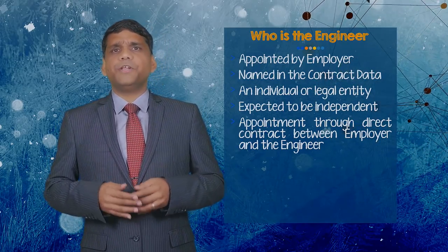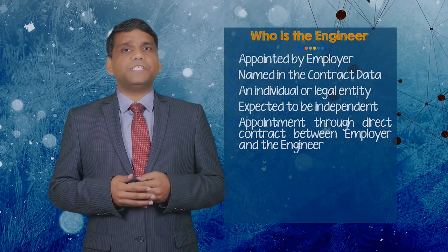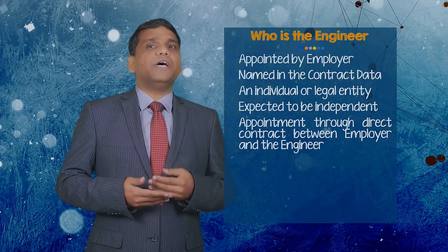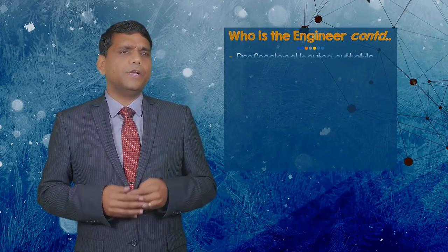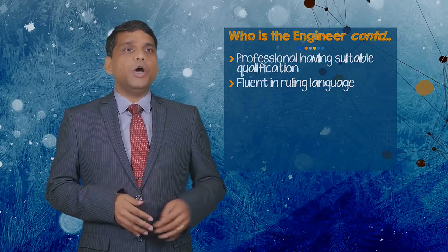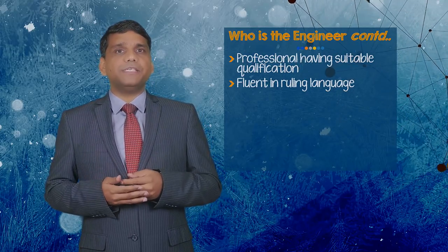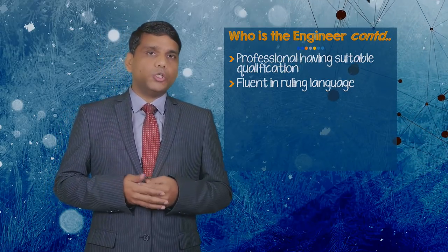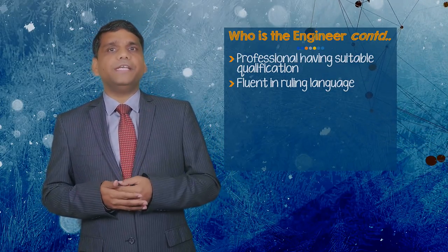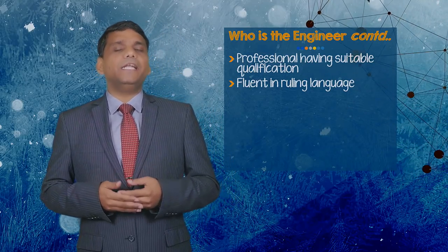The contractor will frequently accuse that the engineer is influenced by the employer's wishes and is unable to act neutrally if he is an employee of the employer. Further, sub-clause 3.1 requires that the engineer should be a professional engineer having suitable qualification, experience, and competence. Also, he should be fluent in the ruling language of the contract, which is defined in sub-clause 1.4, Law and Language, and stated in contract data.